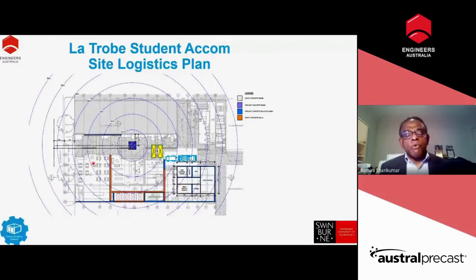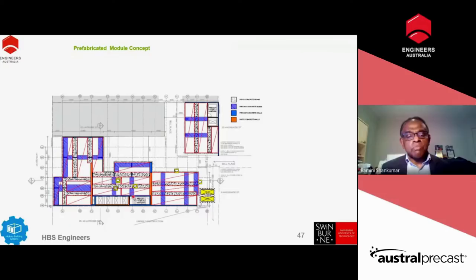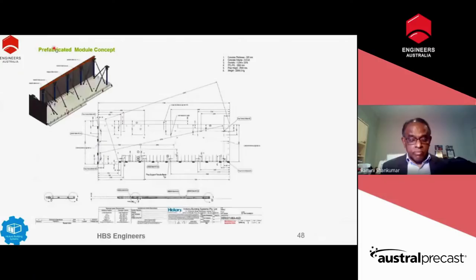And I could tell you, the first thing we have to do is the crane, because the crane radius determines how much we can lift. Then you slice the modular into pieces: precast floor, precast wall, precast core, precast wall. Everything is precast. And then you do some in-situ joints, isn't it? Join them with in-situ construction. So you are reducing the on-site work, isn't it? That's your shop drawing, and this shop drawing has to be done properly.